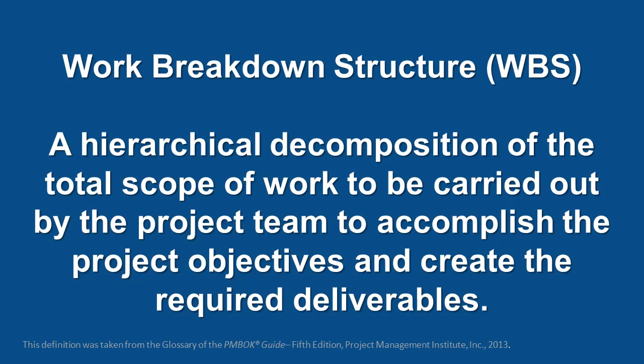A very important tool you will come across is the WBS — the work breakdown structure. Simply put, the WBS is a list of all the work to be executed by the project team to accomplish the project objectives and create the required deliverables. It is so important that it has its own process. Everything — and I mean absolutely every last piece of work on your project — must be defined in the WBS. This is what is known as the 100% rule. If it isn't in the WBS, then you don't have to deliver it. But if it is in the WBS, then you better deliver it.